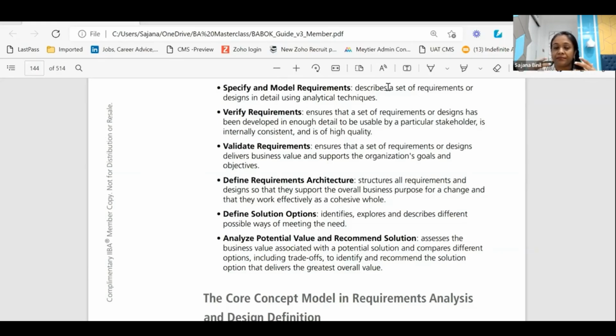So when you connect one user story with the other, what you're doing is creating an architecture for the requirements where the connections are established. And what happens when you have this kind of architecture in a huge backlog where there are 300, 400 features? When the product owner changes one particular feature, you can imagine the ripple effect it will have. When you go and modify that feature, the tool will show you that this particular change is going to create a ripple effect on the following user stories. That is the importance of having these linkages.